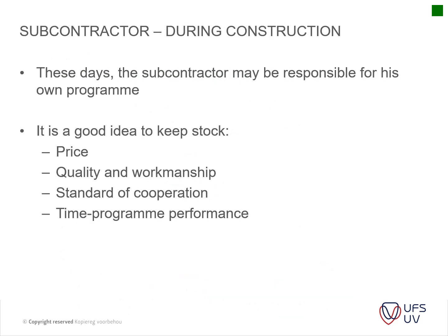Okay, subcontractors continued. These days, subcontractors may be responsible for their own program, and they are. For instance, Amelia, where we worked on, the plumbing contractors had to submit their own program, and that had to slot in underneath the main contractor's program.